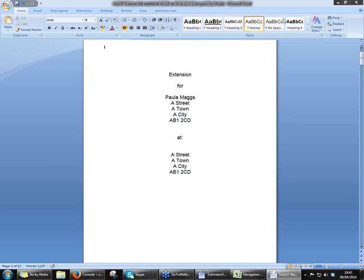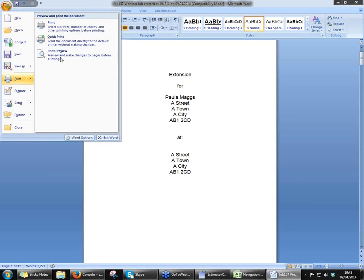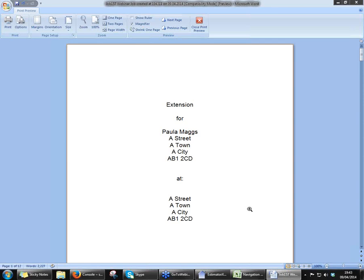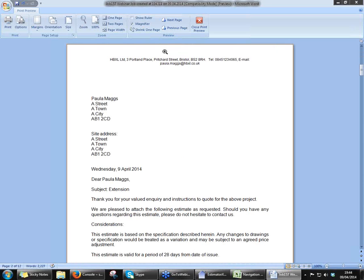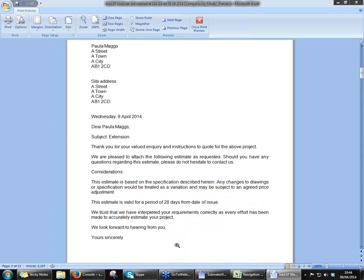So we've got the quote there. I'll just pop it into print preview so you can see exactly what the client would see. So here's the customer's details that I put in at the beginning there — I've entered myself in. So you've got a nice cover sheet, and just imagine that with your own company logos and letterheads on there, looking very professional. If you don't want people to know you're using software, let the client think you've been slaving over a hot PC for hours on end — they don't need to know you're using our software. We also give you one of these letters — remember, this is a Word document, so you can alter the text in there. You might want to put in something like, any variance to this quote must be signed off and agreed to before work commences, just so you don't end up with those 'just while you're here, can you do this job' situations and never end up getting paid for them.